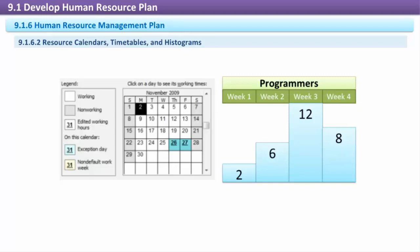The Human Resource Plan includes information on when resources will be needed and in what durations, shown through calendars, timetables, and histograms. Resource calendars show when roles or personnel will be needed by the project, including expected working hours, holidays, shifts, or other important information the project staff will need to know. The plan also includes resource histograms that show the work units by time period that a role, person, or department will provide to the project. These histograms are useful while negotiating for resources with functional managers in the organization to make sure that the resource types needed are available during those time periods. If not, the project schedule may need to be adjusted to accommodate resource constraints, or alternate sources for the resources may need to be sought.